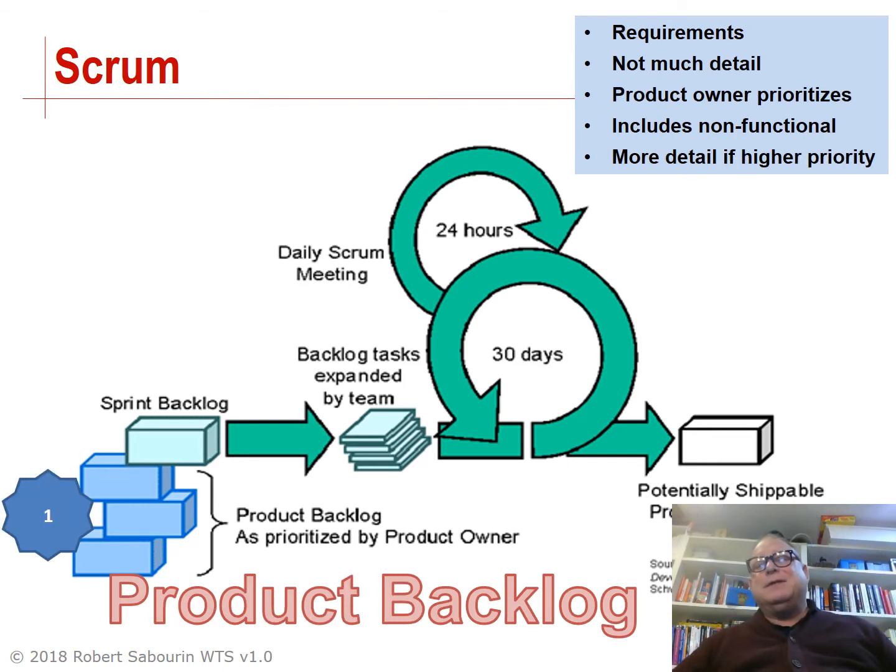Objects. The product backlog is an object of Scrum. The product backlog is a list of requirements. The product backlog does not have a lot of detail. It is indeed very different from a standard traditional IEEE 830 style formal requirement specification document. The requirement list in an agile team using Scrum very often is 1 or 2 bullets of text per requirement.